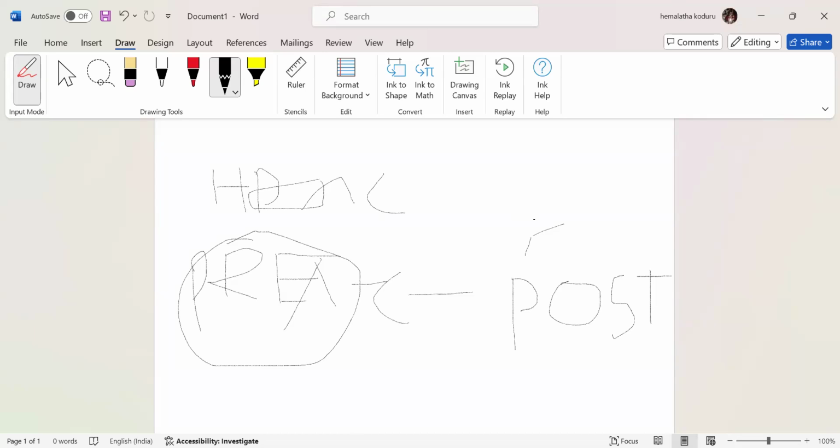Go means you have to move the changes to production. No go means they will have some conditions; we are not reaching their expectations. They will have some comments, and we have to rework on that. Mostly we have followed everything precisely from the requirement gathering phase through realization to the cutover phase, but still they may have some doubts or gaps, so we have to start again. By that time our go live will be a little delayed.